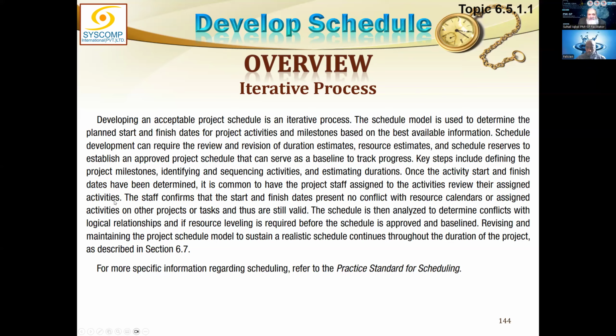When the people review their job, they feel differently. They feel the schedule says that this job can be done in 3 days, but this is impossible to do in 3 days. So the staff may suggest that we will take 5 days to complete it. Now, this is a problem. This has to be put up with reasons as a change request to the higher authority to see if it can be rebaselined. So, this is a reason for the change.